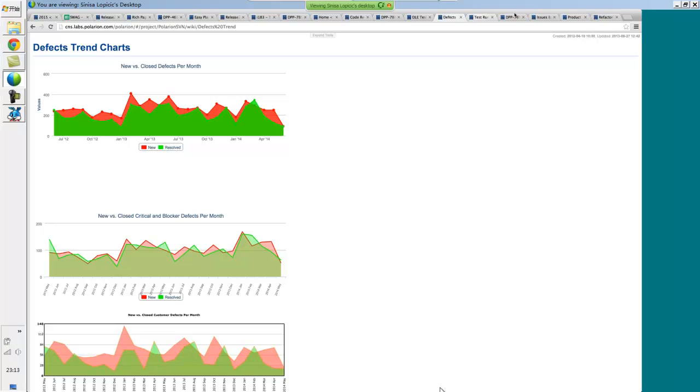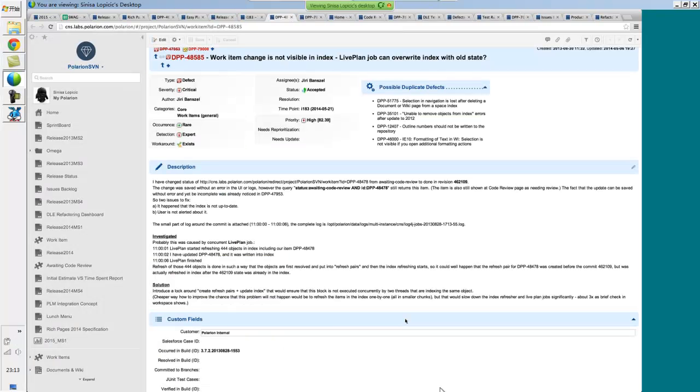It's found by us. We obviously have defects that come from the customers, and you're going to see here in this field a large number of customers. The way that priority gets calculated is by taking mathematical calculations: number of customers, occurrence, detection, workaround, and severity into the calculation, and there's a mathematical way to calculate it and to assign it.